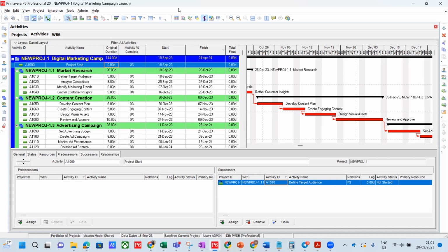But when it now comes to, oh, John is an electrician, Tayo is a plumber, Daniel is a mechanical engineer, you are now digging down to named resource. You are not talking about mechanical engineer, I have mechanical engineer.